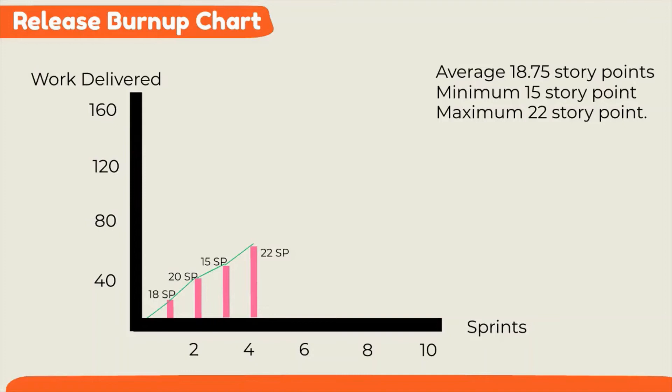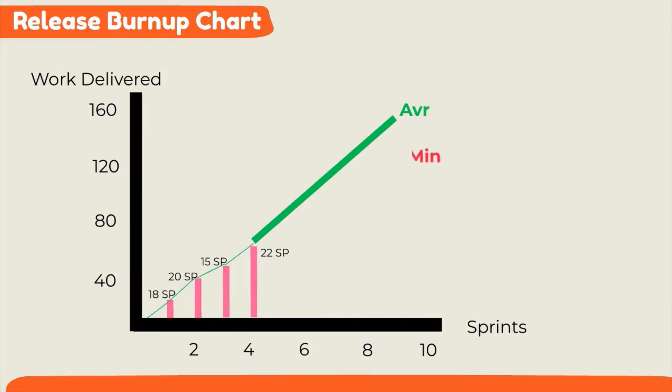Based on this, the product owner can draw the predictive line if the team always delivers on average, another line if they always deliver the minimum, and a last line if they always deliver the maximum.